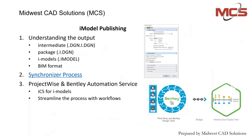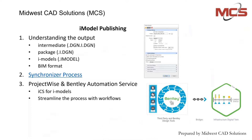A few other notes: the synchronizer process — you have a couple of different ways to generate and keep design models intact. You need to understand when you want to publish it, what state of your design. You may want to do it at every submittal — 30, 60, 90% done in your design process. If you want some kind of nightly repetitive synchronization process, you can also do this via the automation services in ProjectWise, which could be a whole other topic on its own.